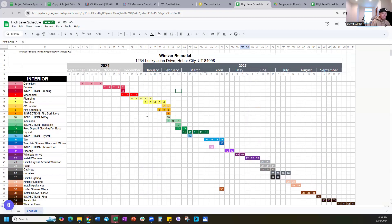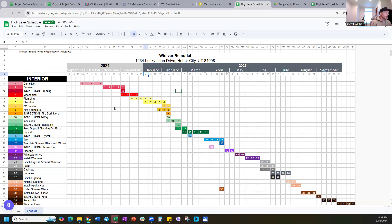Jobs can be staggered, but the biggest thing is actually tracking the schedule. When you have your weekly meetings — your superintendents, project managers, or if you're the owner — you want to meet weekly for about 45 minutes and go through the schedule for every job. It's pretty critical that you have that weekly sit-down.